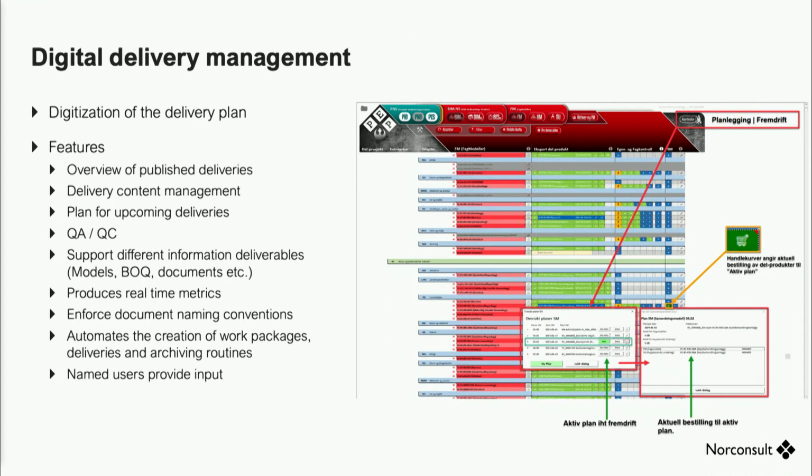One important step, which I think is quite unique, is looking down into really minute details. We have an overall master schedule for information deliveries to the client and to the project itself. But internally, we have developed a tool to break that down even further into our own work packages and how we manage information exchange, information delivery, and interfaces between disciplines internally.